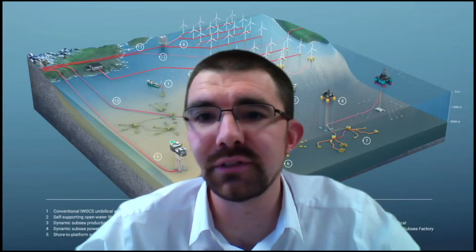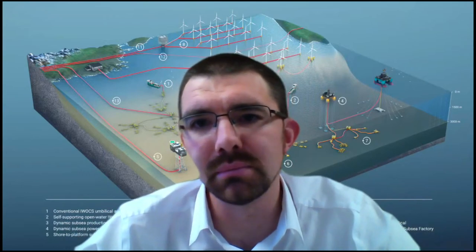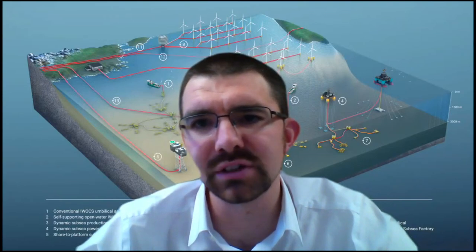You can try to squeeze two in if you've got them set up side by side and you don't need to move the test equipment. But certainly a 12-hour shift for one full test of a cable. Detlef, what is your experience? Yeah, it's the same. It takes a shift more or less to test the cable, if you test the full string, yes.